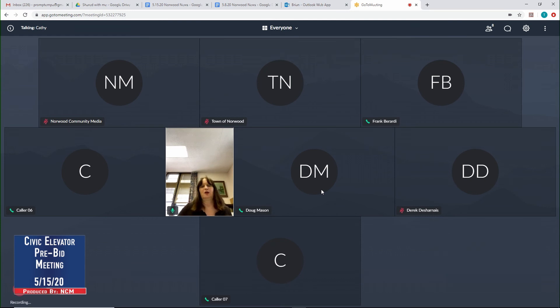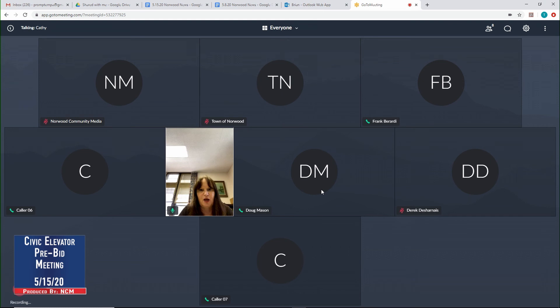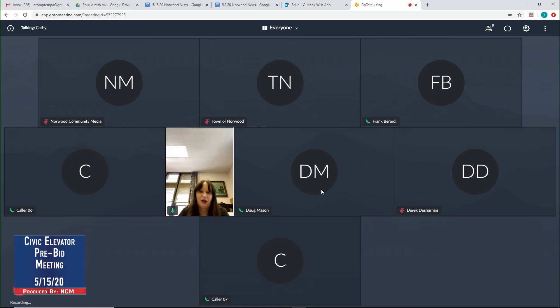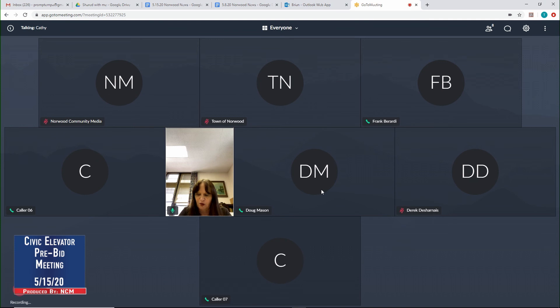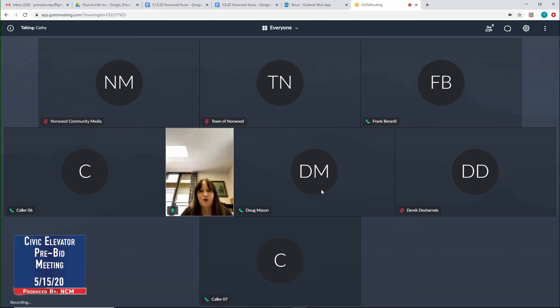So what I'm going to do then is I'll start off with the bid process, and then from there I'll open it up to Frank Barati, who can speak about the technical portion of this, and then we'll open it up for any questions. Right now, the bids require a DCAM certification in electrical and the general contractor will need DCAM certification in elevator. The filed sub-bids are opening May 21st at 11 o'clock, and the general contracts are opening on May 29th at 11 o'clock. It does require the Certificate of Eligibility and the update statement, as well as a 5% bid bond.